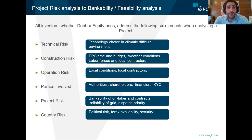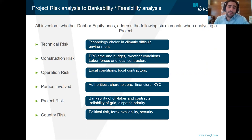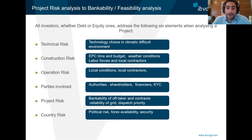We also look into who the parties involved on that project are — what are the authorities like, what are the laws and regulations like, and what do the financers need for the successful bankability of such projects. We also look into the project risk, like the bankability of the offtaker and the reliability of the grid. Finally, we look at the country risk — for example, what the political situation is like, whether the country is safe, and whether there are sufficient foreign exchange reserves available for payment from the offtaker.